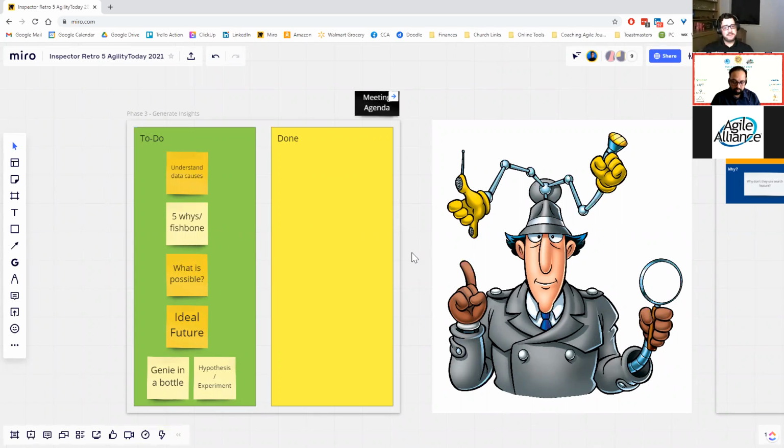I'll tell you about a recent retrospective I did. We did a fishbone diagram. We drove out a fishbone, but we had 5, 6 different topics that we pulled forward. We only got into 1, and we had wonderful conversation because that one was the most important one that resonated with everyone. So we dove into that one very deeply, and it was in that one that we saw great conversation and great feedback come out.